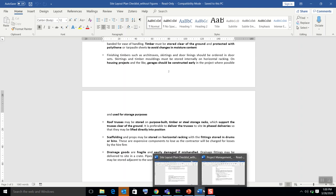First, you need to identify what is required under the main categories — what offices and accommodations are needed — and then determine their sizes, which should be included in your report. When determining size, consider how many people will be accommodated and how many will use the premises. Consider the height of these facilities as well.